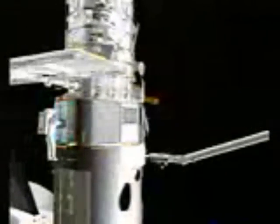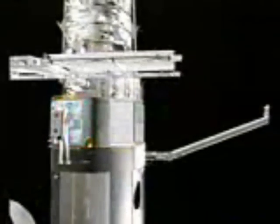While John's doing that, Rick will be doing another get-ahead task for EVA 3. He'll pre-position thermal blankets on bays 5 and bays 10. After this, the crew will do a payload bay cleanup, and then they'll ingress the airlock. And that completes EVA 1.